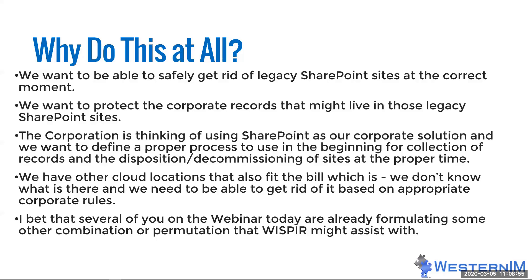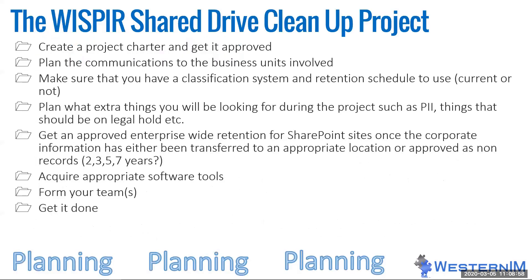Several of you are probably already formulating some other combination or permutation that Whisper might assist with. Let's outline the consistent pieces of a Whisper SharePoint cloud inventory project. The first step is to write a project charter and get it approved through the management group — you may already have one if you've done other Whisper projects. Once that's done, deciding on a communications plan so that business units are involved is really important.